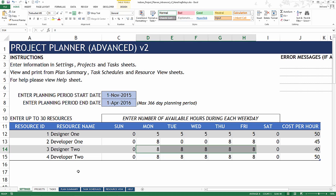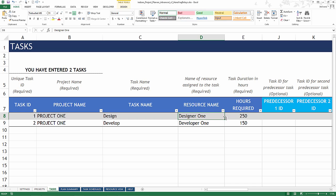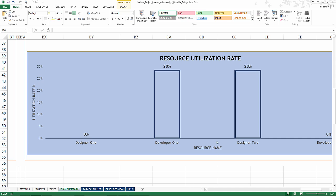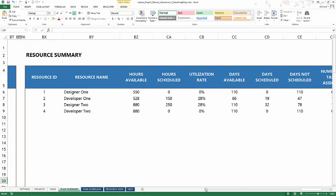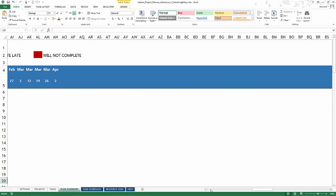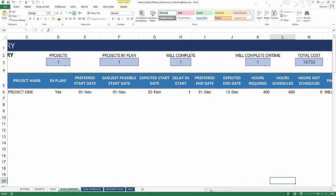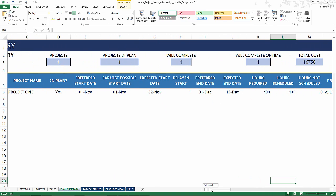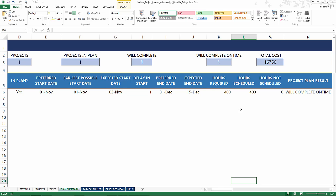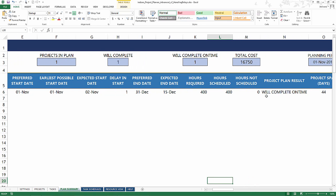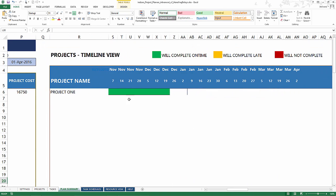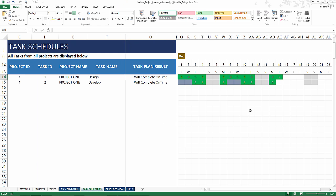So now I'm going to do exactly that. I'm going to go to tasks and change this to Designer 2. I'm going to go back to the plan summary and you can see that the chart is updating. The more interesting part of the sheet here is the project summary which says that now the project will actually complete on time and it is going to end on 15th December. The timeline view now shows in green. Task schedule now shows that Task 1 will complete on the 15th and Task 2 will complete on the 6th. So all we have done is assign the delayed task to a resource who has more availability, who is available for more hours every week, and that clearly solved the problem for us.